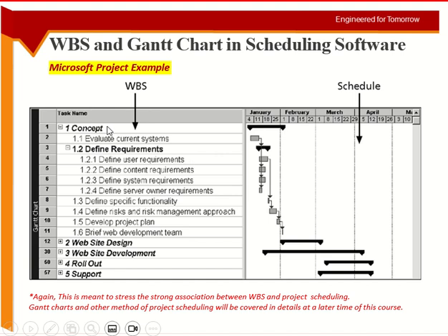So this is where you need to look at the lowest activity. I already gave you the 8/80 rule. This is why you need to be careful, because if you are merging different things into one task, or making 2 small things into one task, then it will be hard for you to define their duration. And their duration will affect the main activity, the main deliverable.